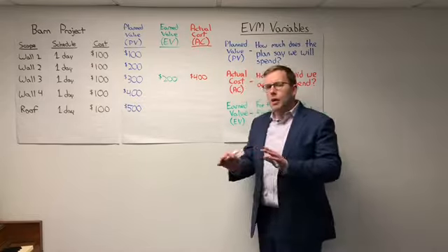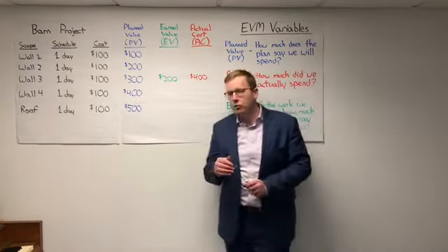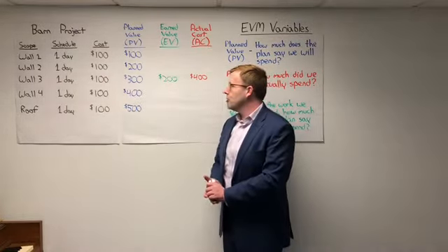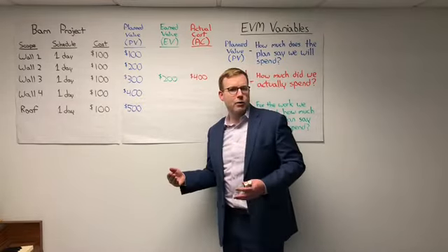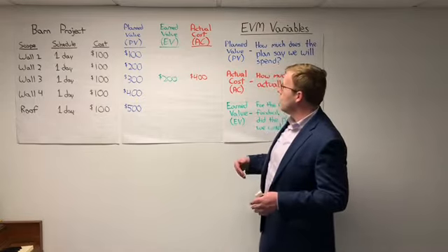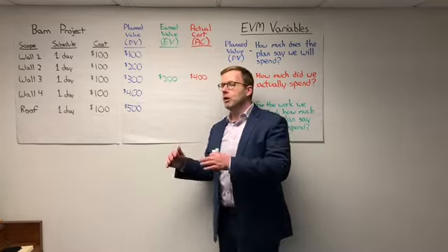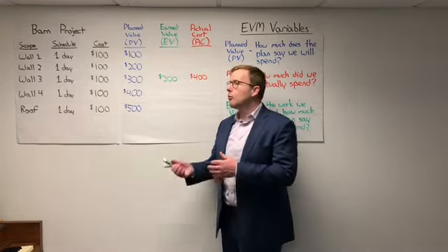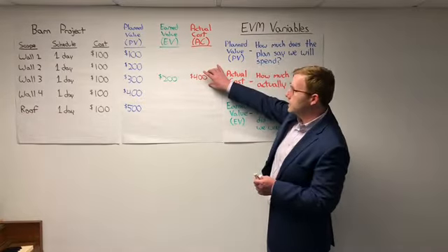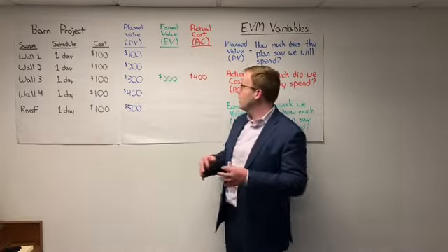And I want to give a quick aside. We mentioned earlier that sometimes actual cost is tough to identify. That is because in our situation, I'm only working for a total of 5 days, so I might be able to keep close track of all that stuff just watching it all, right? But on a large project or program, maybe reporting periods from the accountants, reporting periods from an invoicing standpoint, reporting periods from a timesheet standpoint. This might be data that actually takes a little bit of time to roll in.